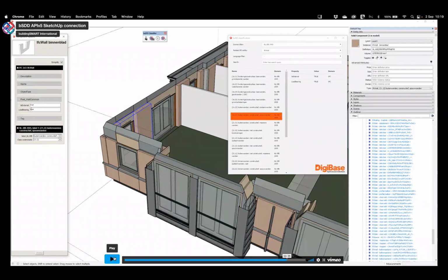And what always goes wrong is that half of the models from the manufacturers don't have the correct information. It just doesn't run on the Solibri rule sets because it doesn't have the correct properties, or didn't use the predefined material list, or made a typo in the property name. We looked at how much that happens, and it's only like 3 or 4%, but it happens every week on every transaction, every time again. So the business case for using the bSDD for contractors like that is massive.